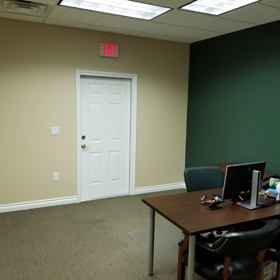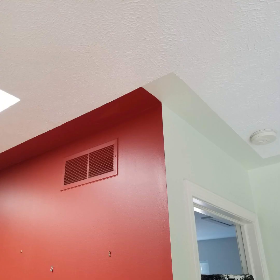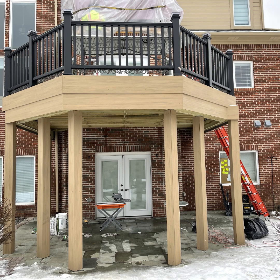And this was an Edward Jones office, I believe. Bathrooms, they range, but usually labor for a bathroom is no less, even a very sparse bathroom is no less than $6,000 because of what work's involved. Oh, another transition. There it is again. Anyways, tile, depending on the tile, and decking is the same. This deck obviously was pretty expensive, and I will never do a deck without having a signed print copy of the actual design for the deck, because this was so many change orders, so many changes.